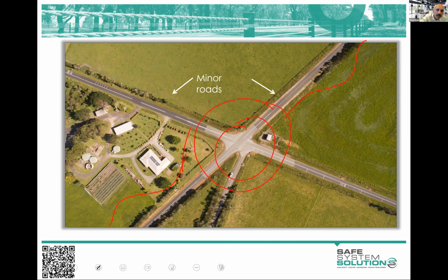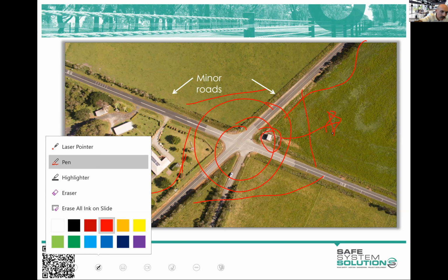And they're basically massively having to take this land. That's a telecommunication exchange building. They had to move that. I think that was going to be $1 million in its own right to move, let alone the land take. And it just blew out. And they said, yeah, no, way out of what we can afford.